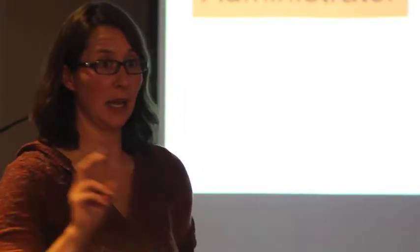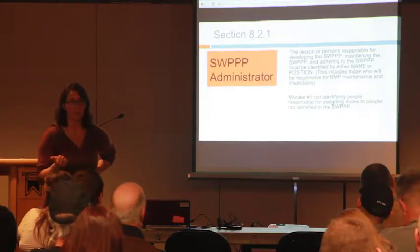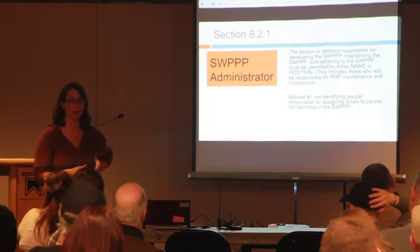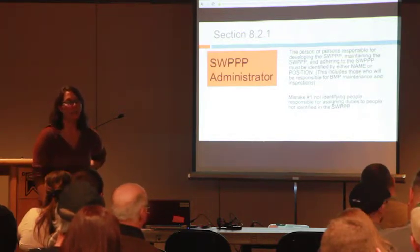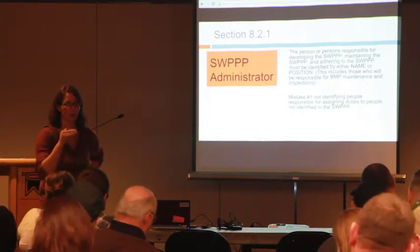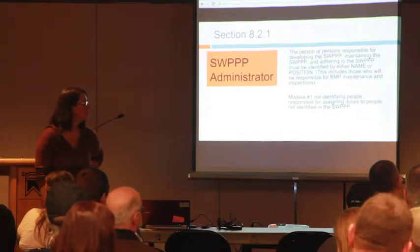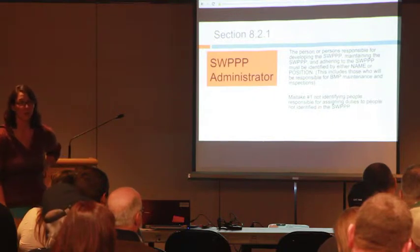So we don't have a minimum education level, but we do require that they be familiar with the site, familiar with the BMPs, and how to maintain them, those basic things that we're looking for in the inspections, so that things don't fall through the cracks. It should probably be your site superintendent or somebody higher up the food chain. If they're giving it to somebody that doesn't know, most likely you're gonna be in violation of other things. We're gonna have a lot of conversations with that company.